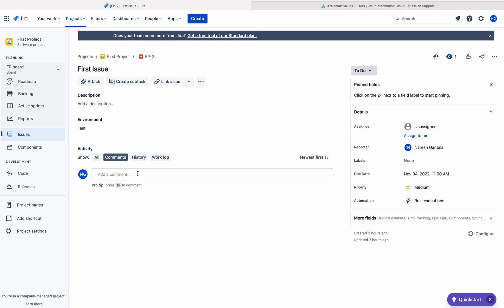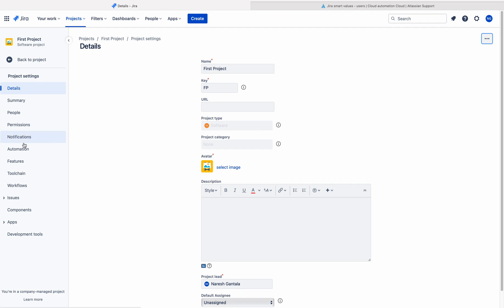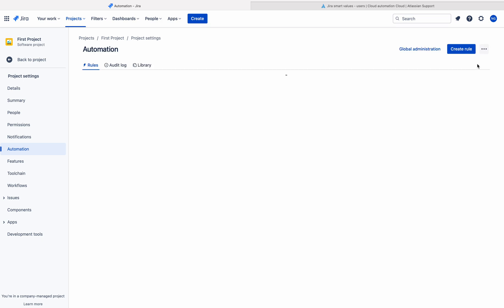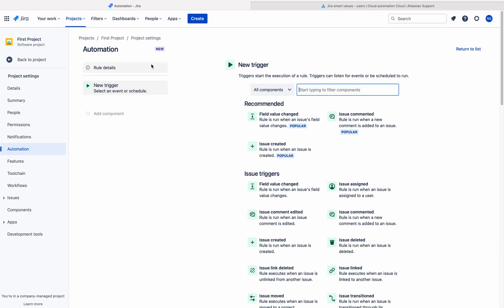To do that we have to create an automation rule. Go to project settings, click on automation, and click on create rule. Here we need to select a trigger point. There is no manual trigger here, so the automation has to run every 30 minutes or every one hour — we need to give a schedule to Jira.